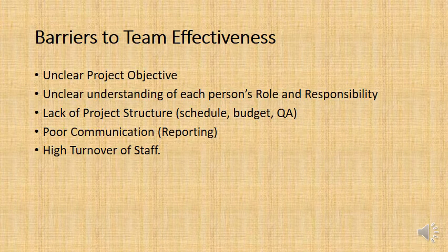So what are certain barriers to project teams being effective? Well, one of the key difficulties is when there are very unclear project objectives and the project scope is unclear as well. One of the big issues is if you've got a project team which has 100, 200 different people, you could have people at one end of the project building the project at a very high quality, whereas at the other end they're building it at a lower quality, at a lower cost and in quicker time.